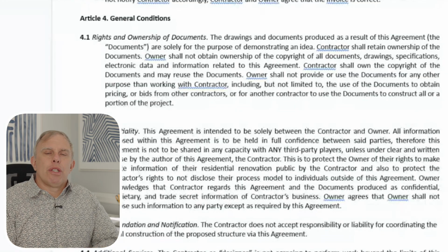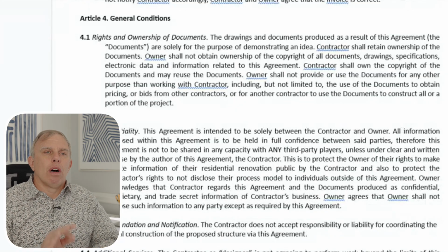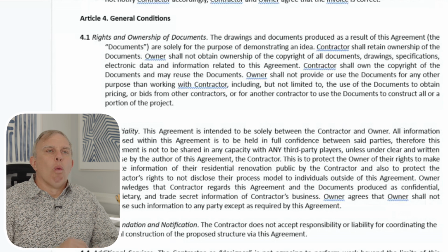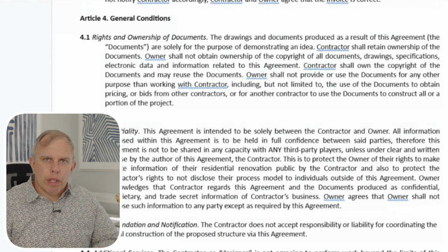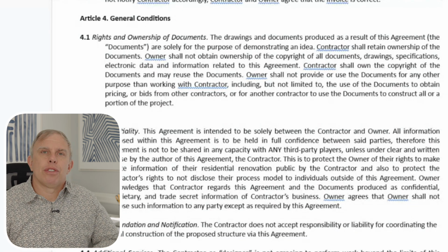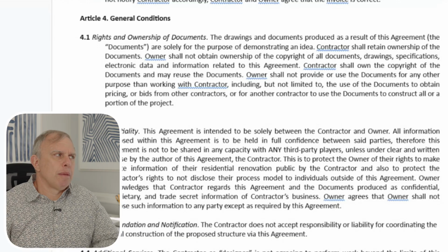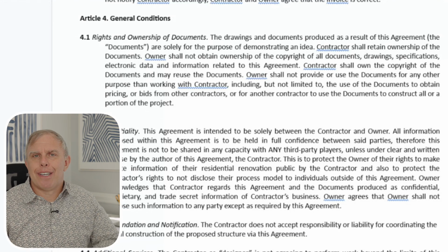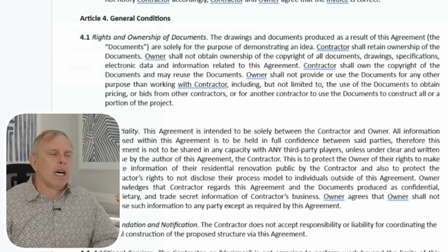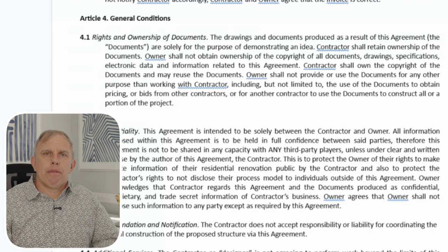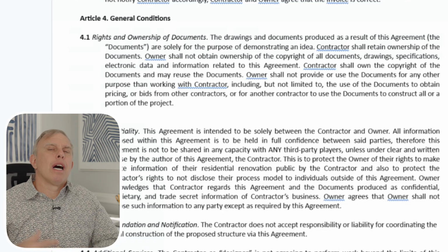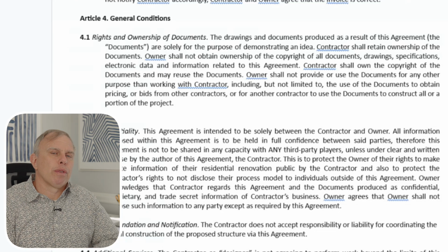With this agreement, you do not become the owner of those documents. Once you sign a construction contract with us and we are building it, you are officially the owner of those documents and we're going to build the project. So I wanted to be very clear about that. Sometimes some folks ask about that item and I like to bring it up, but the services that you're paying for are described in here, but they do not give you ownership of the plans that we've created.